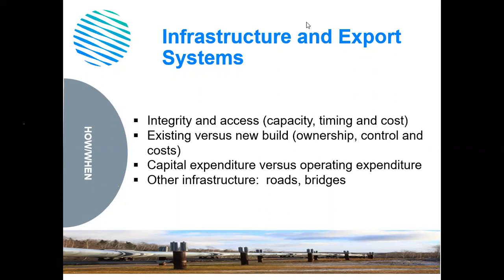In terms of existing versus new, both the next two points lead on from this. Particularly if the project is relatively modest in size, using existing infrastructure is likely to be more economic and will reduce the project's capex and therefore its funding requirements. On the other hand, if there's no existing or available or affordable infrastructure nearby, you won't have any choice but to build your own, and we'll have to factor in the costs accordingly.